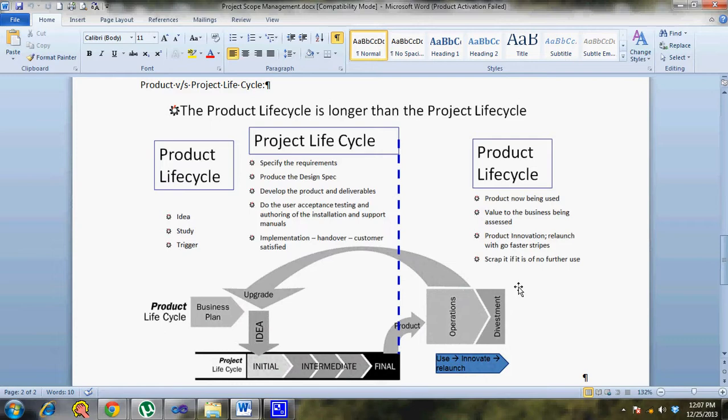Now from there you come to the difference between product scope and project scope. The product scope is the features or the characteristics or the functionalities the product should have, but project scope is, if I want to build a particular product, the boundaries that are involved in terms of analysis of the requirements, designing it, then developing it, testing it, then making it ready to be operational. So this becomes the project boundary, but the product scope is more related to what all functionalities the specific product should have. So that's the difference between product scope and project scope.